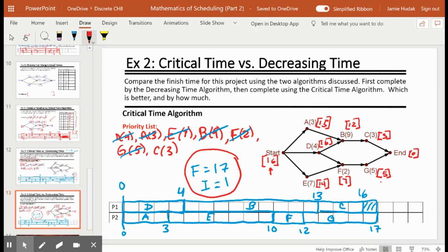And that is why project timelines are helpful in finding ways to avoid downtime with our workers, or if we're talking about bigger projects, if we have to rent a couple of cranes on a job site, we don't want to rent them if they're not going to be used. We don't want them sitting around idle.